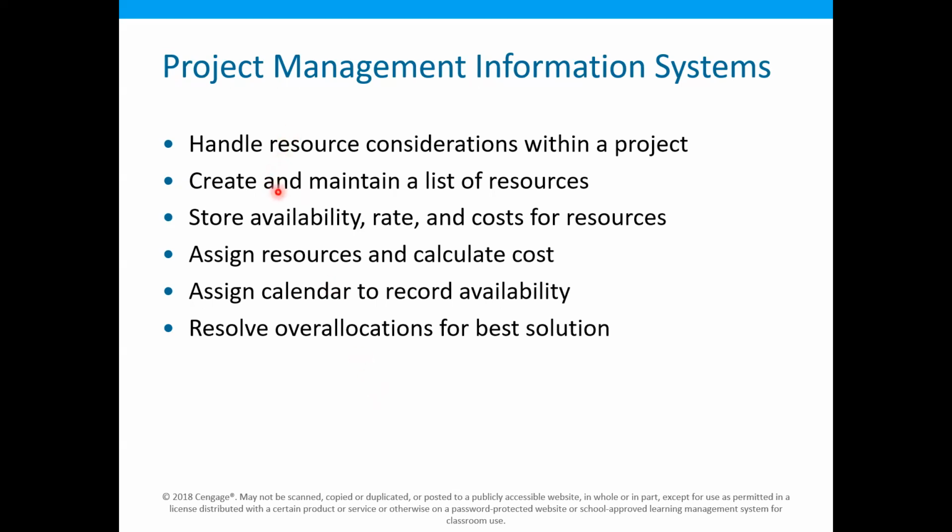Project management information systems. So when we talk about the project management information systems, we talk about the project management software. Using the project management software, we can perform the resource allocation in a more convenient way. We can create and maintain a list of resources. We can store the availability rate and costs for the resources. We can assign the resources and calculate the cost. We can assign the calendar to record availability, and then resolve over allocations for the best solution.